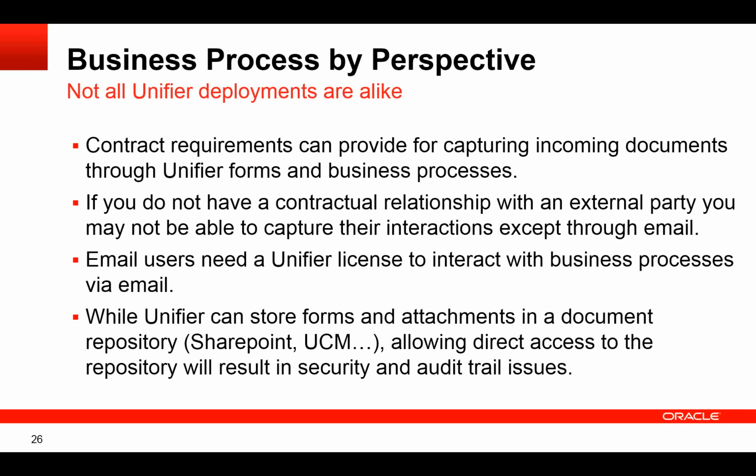If you have it in the contract that someone must participate or submit documents to you through Unifier, then you're more likely to capture their information. If you don't have a contractual relationship with an external party, you may have to take emails received from them and then incorporate them into Unifier.